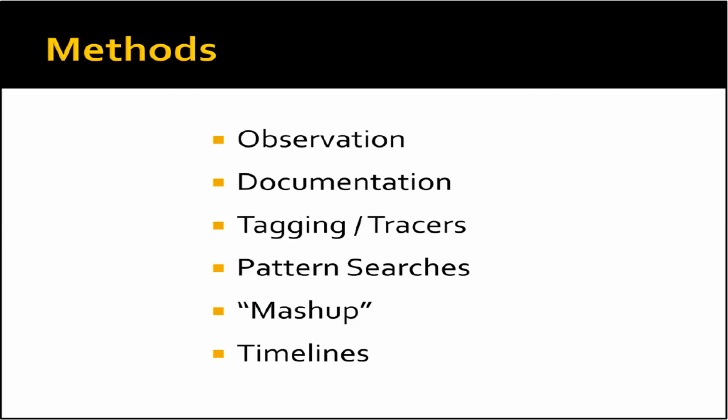Documentation is another fairly easy to use method of tracking. If the project requires changes to documentation, maybe a particular type of note template is added into the EMR, you can pull up information about how often that note is being used and the results it has on other project deliverables. Documentation is also a great way to track long-term implementation and acceptance of changes made by a project. If you create a regular timeline for checking on the sustained changes, you will have documentation to better show the